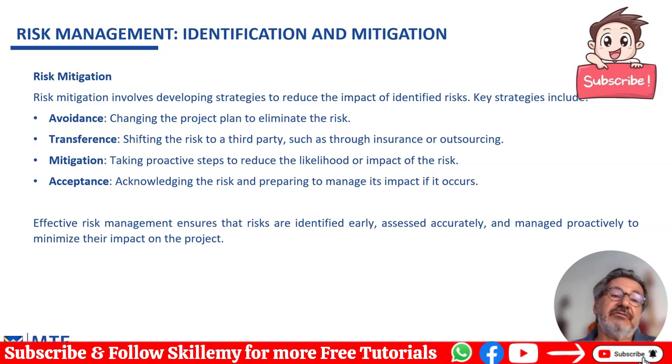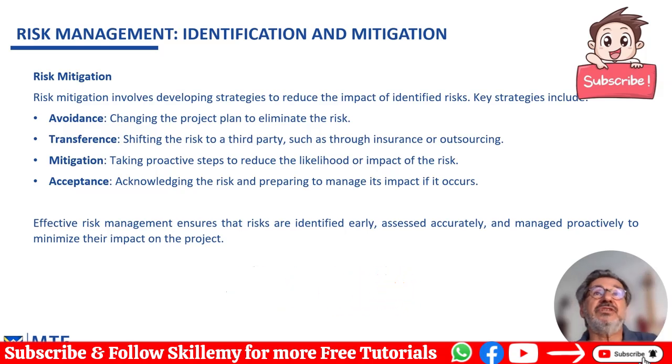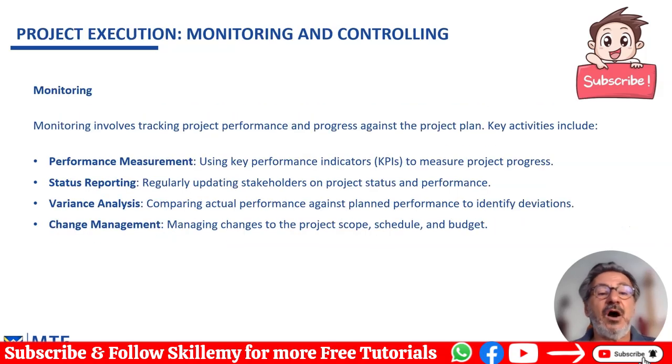Key strategies include, first and foremost, avoid the risks. Change the project plan to eliminate the risk. If there is an identified risk relevant to this task, you can either change the task, change its place within the timeline, or give it more time or more resources so that the risk decreases. Transference, shifting the risk to a third party, such as through insurance or outsourcing, so that it can be better addressed by another party. Mitigation, that means taking a proactive step to reduce the likelihood or impact of the risk. And finally, acceptance, acknowledging the risk and preparing to manage its impact if and when it occurs. Effective risk management ensures that risks are identified early, assessed accurately, and managed proactively to minimize their impact on the project.